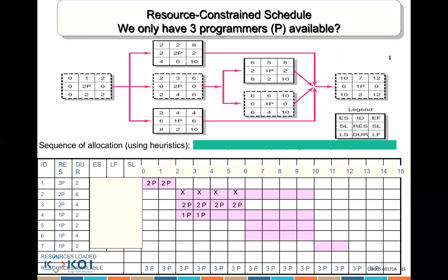That's why we try to assign the resources when they can be available to finish that particular job together, without splitting the task as much as I can. Okay, it makes sense. Does that make sense? When you split the task, there's a lot of setup time required every single time. The less splitting you do, the better it is for your project.